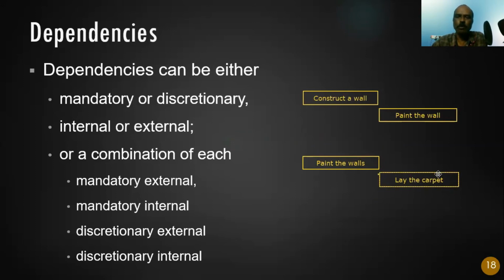But this is a good practice. Painting the wall first, clean the room, get the painter out, then lay the carpet is a good practice. That is what my experience tells me. That is what my common sense tells me. Because otherwise I might damage the carpet. I might unnecessarily have some rework. But this is not mandatory. I can still do it this way, nothing wrong. Okay, nobody can question me.